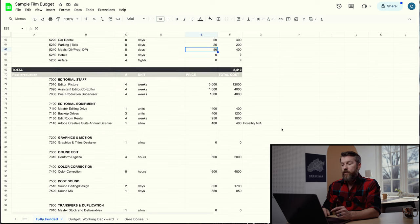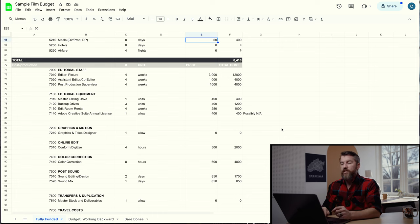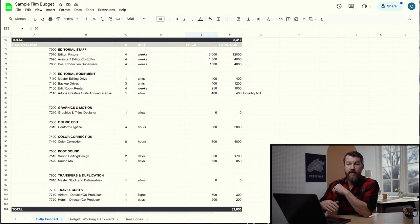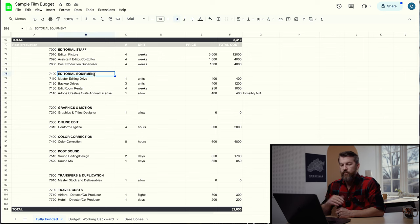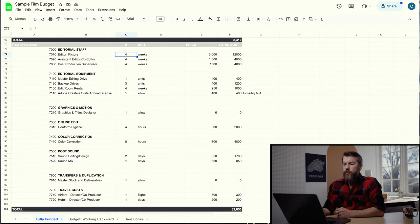Now we're through production and moving into post-production. Post-production consists of a big section of time for the edit, and then a shorter but expensive part for sound design and color. Everything in post goes here — editorial staff, editorial equipment, graphics, color correction, post-sound, and any travel costs. For an editor, unlike a DP or AC who work on day rates, editors often work on weekly rates because editing takes much longer than actual production. We'll put the editor at $2,500 per week.